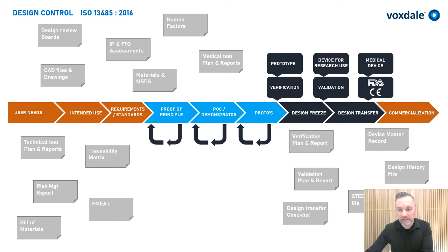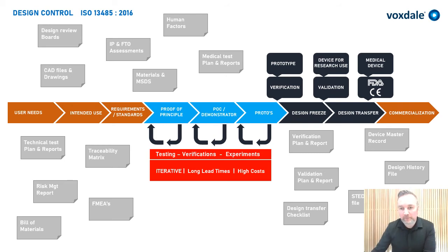A part of my presentation is focusing on this phase, where you move from requirements up to final prototype. That's a highly innovative and creative period, but also one with a lot of loopbacks, iteration, changes, design uncertainty. Because this is a highly experimental phase, trying to verify if your ideas or sometimes crazy ideas could work, making it unknown, unsure about lead times and costs. And as we have often seen, we underestimate those two factors.